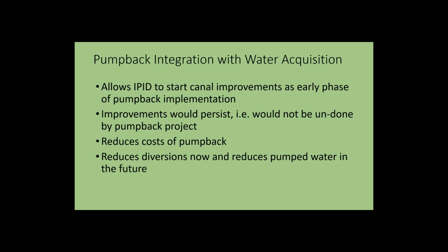It has a couple of benefits for us. One, it will reduce the costs of the pumpback if we make some of those investments now rather than later. And that is extremely helpful when we're looking for the kind of money we need for the pumpback. I think you all have seen cost estimates in the $25 to $30 million range for construction of the pumpback system. So we can start to chip away at some of those costs now. It makes the pumpback down the road a lot more viable.